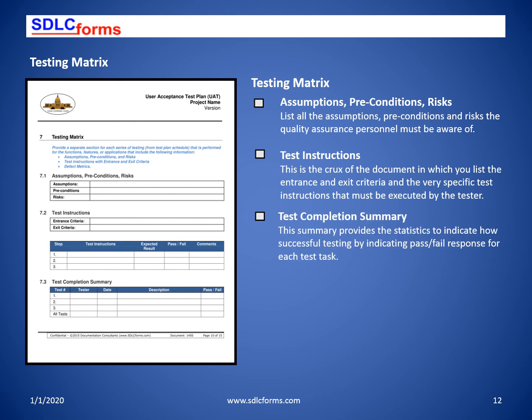Utilize the test plan schedule to summarize pre-testing conditions. The assumptions, preconditions, and risks should also include all dependencies and constraints. The test instructions will list each step number and identify the specific step-by-step instructions that the tester must execute, the expected result, whether it passed or failed, and any pertinent comments. The test completion summary identifies the test number, the tester's name, date executed, a description of the test, and whether it passed or failed.